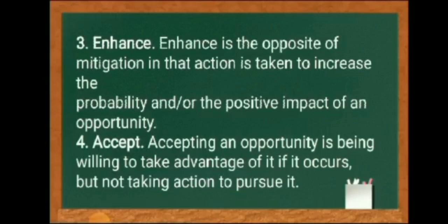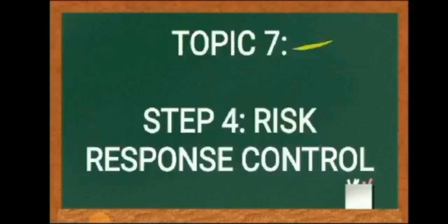Number four, accept. Accepting an opportunity means being willing to take advantage of it if it occurs, but not taking action to pursue it.